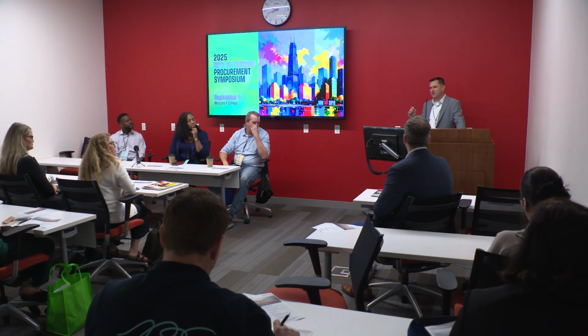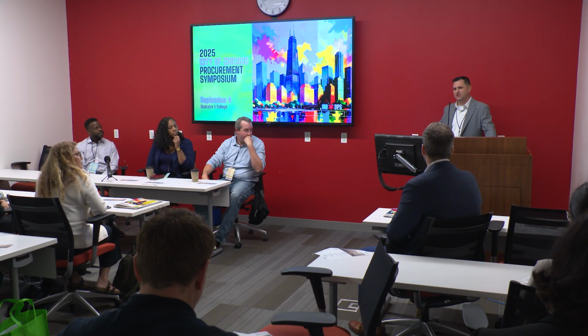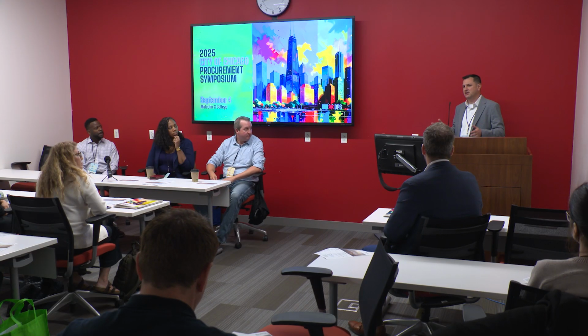Thank you. One more, because I want to address that too. It's really project dependent as well. On Terminal 5, Sean can correct me, there were multiple packages for electrical, right? There was basic electrical, low voltage, security, all these different packages. You've got to break it up, so you have multiple electricians out there, and that could be a good thing or a bad thing. On a smaller project, because that was $700 million, I'm on the Terminal 3 project, it's only $300 million. We have one electrical contractor, right? So we broke the packages based off trades and basically spec section. Each project has a different approach.